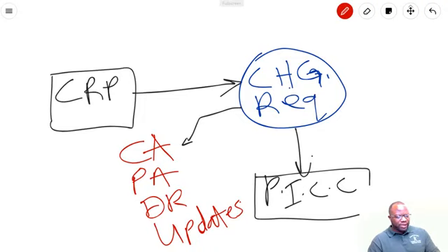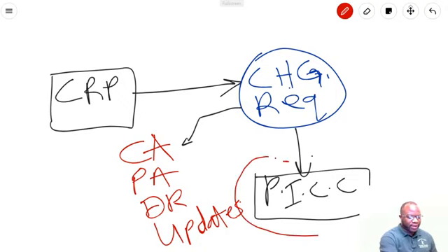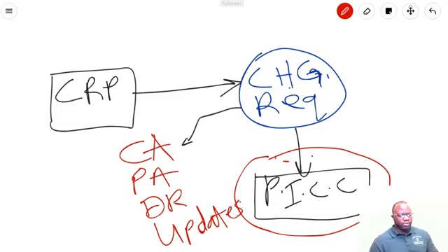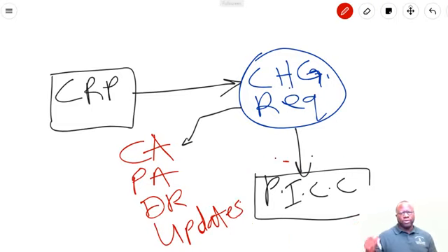What happens next? Well, after putting in a change request, it needs to be reviewed first by the project manager. So within perform integrated change control, we, as project managers, are reviewing change requests with our team. Maybe asking additional questions. Is this what you meant? What parameters are we talking about? So on and so forth.